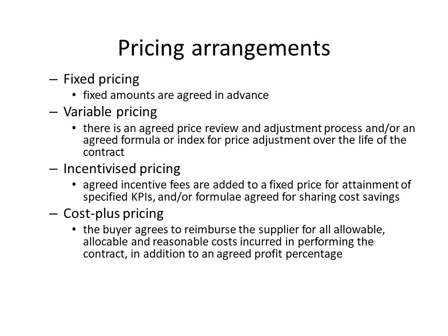Pricing can be fixed, as in it doesn't change. It can be variable, where you've got contract price adjustment mechanisms. You can use incentivised pricing, where there can be agreed gain pain, which we'll cover shortly, or the worst case scenario, full cost plus, where you allow them all costs plus an agreed percentage. And obviously there is no incentive for the supplier to reduce their costs in this scenario.